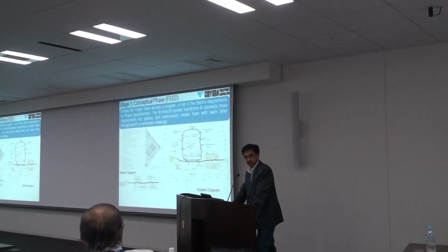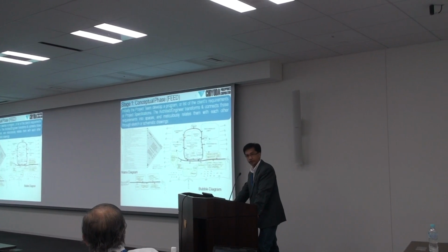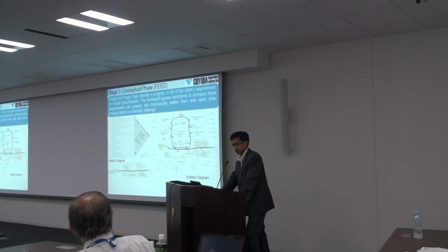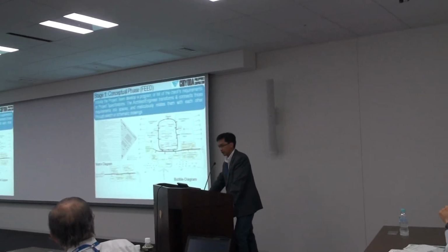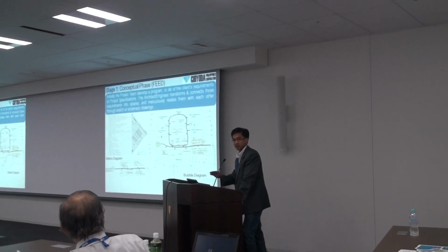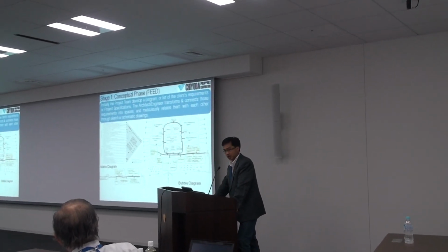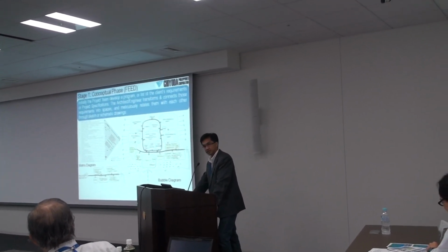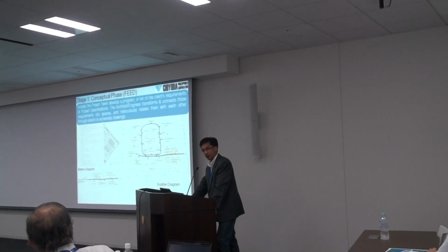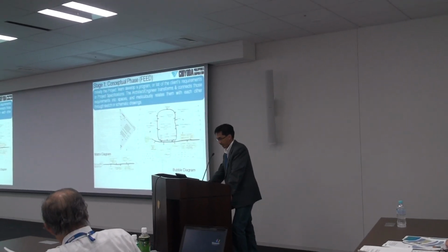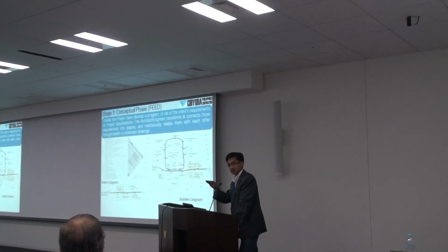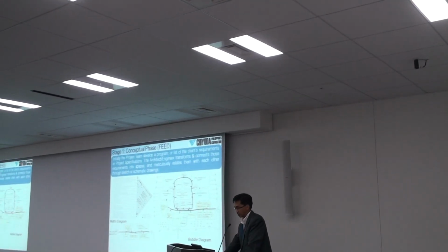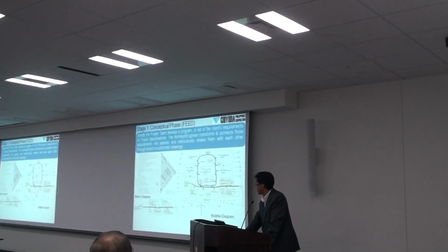So the first stage is the conceptual phase, which belongs to the front-end engineering design of the plan. Initially, the project develops a program, where the client must list down all his requirements and project specifications. The architect then transforms and connects these requirements into spaces and meticulously relates them with each other through sketches and schematic drawings. This is an example of the matrix diagram.